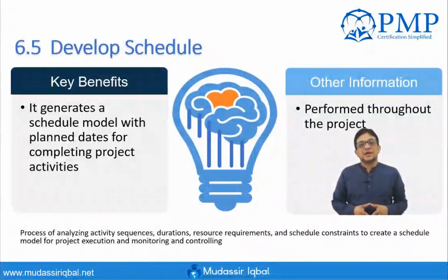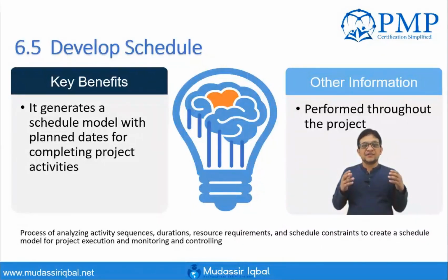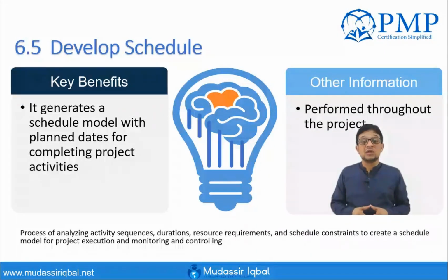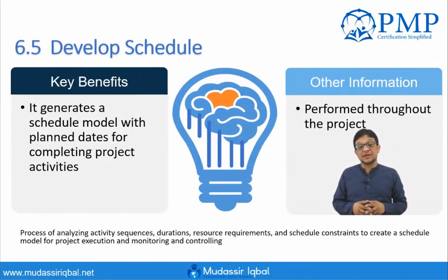Now the most important process of the project schedule management knowledge area. All the effort that we have done, starting from the work breakdown structure, which is actually a visualization of the deliverables, then moving to the work package level, identifying the last logical component where we as project managers want to control the project, then finding the activities that need to be done to deliver the work package level, sequencing them, and finally identifying the duration, and obviously resources will come as part of the input.